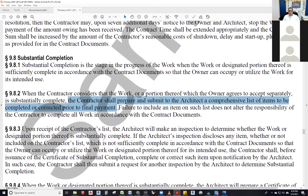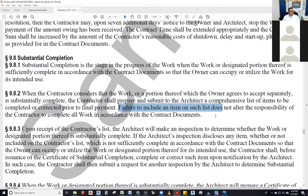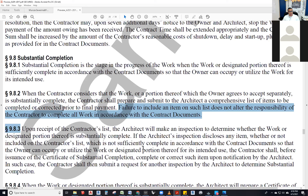We as architects will review the punch list and can reject items and say 'no, that's not right — it's non-conforming work.' Also, failure to include an item on the punch list does not alter the contractor's responsibility to complete all work in accordance with the contract documents. If they didn't put it on the list, that doesn't mean they're done with it. That item could be found at any time — in fact, you have a year to identify it.